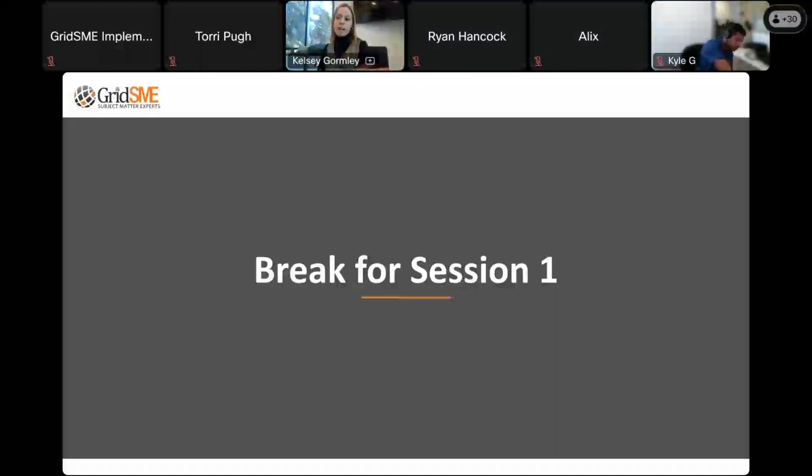And Pat is going to talk about that a little bit more in depth in our next session. But we do want to get engaged early so that once we start submitting documentation to CAISO, we're sure it's accurate and it's not going to change. So like 15 months, with a couple months of engagement, and then a full year from submission of the project form to being fully COD. Right. Perfect. Excellent. Thanks.